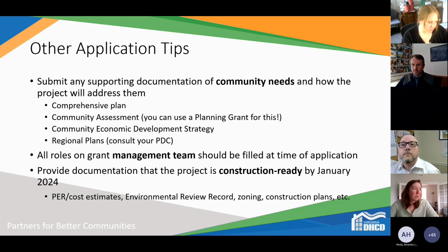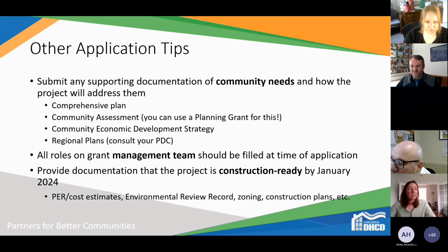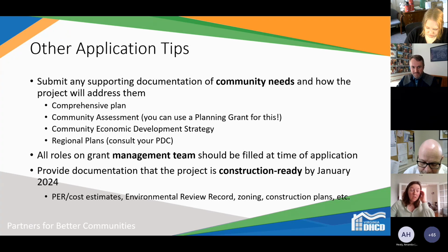We will appreciate that. We do look for that all the roles on the grant management team are filled at the time of application. And then providing documentation that the project is construction ready. We specifically ask or score a project based on its construction readiness.